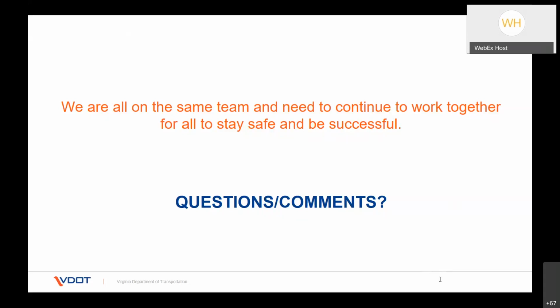I'd also like to add, going back to the resources of the railroad, they are very limited, and flagging is a big issue and a big cost. Whether it's VDOT, a locality, or a private entity, when you get a flagger on site, make sure they're being used and the contractors are diligently prosecuting work while they are there. We've had several instances on some projects where the flaggers were out there for 2 weeks and didn't have to flag. There was no activity on the railroad. That was a complete waste of funds and a resource.